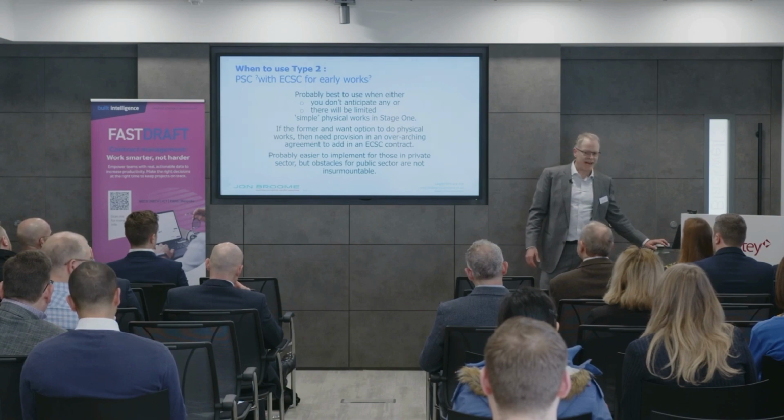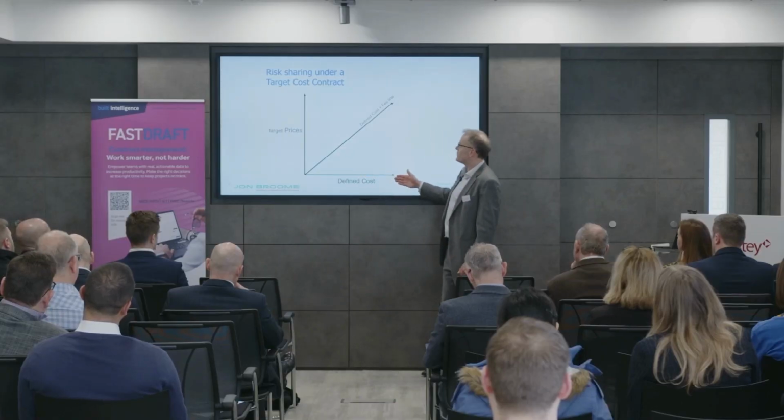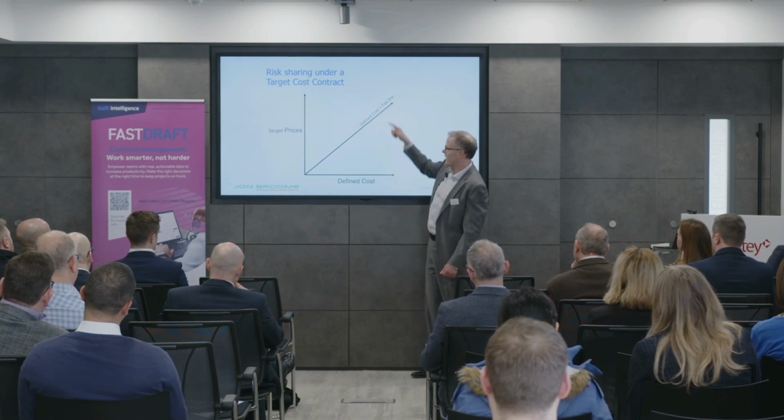So now, a quick dive into target cost contracts, just so that people know what a target cost contract is if you don't. So, in a target cost contract, the contractor is reimbursed defined cost plus a fee, to give a line going up here.